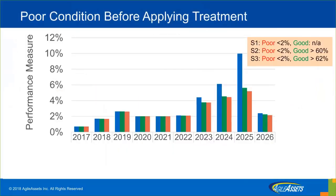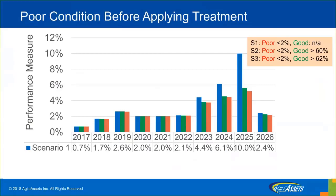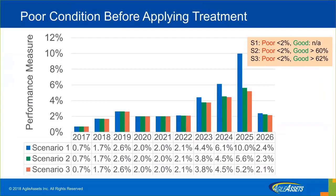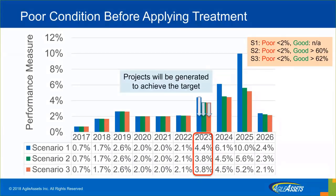This is the result for percentage of poor for each year across all three scenarios. The system works such that if the percentage of poor for a scenario goes beyond the constraint, the system generates optimal projects to bring that condition back within the constraint. For example, in 2023, optimal projects will be generated to achieve the 2% target for all scenarios.